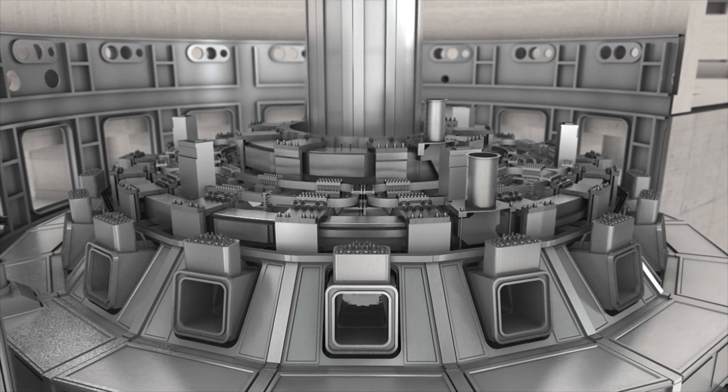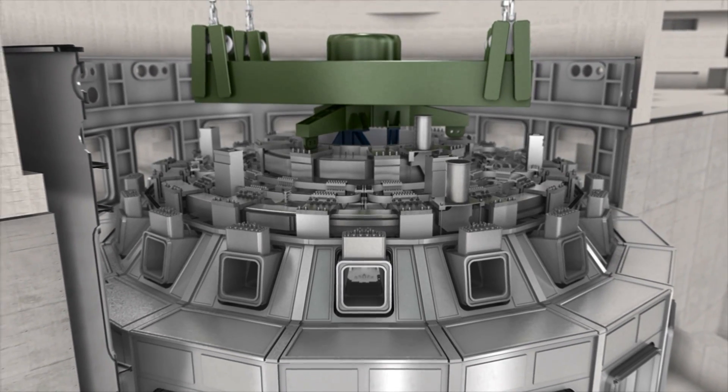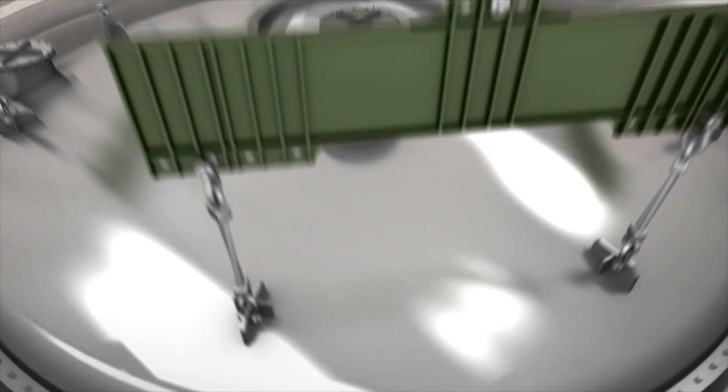Last in line is the 18-metre-tall central solenoid. The powerful electromagnet will be the last major component to be installed in the machine pit before the cryostat is closed up.